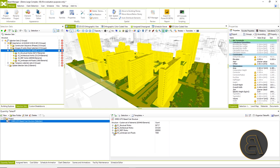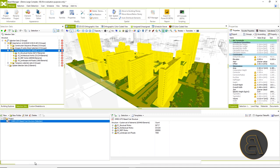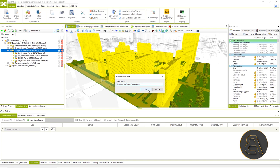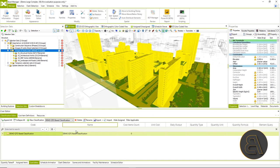Once we have generated the QTO, we can move on to creating a budget structure, a cost classification. And with the help of the creation wizard, we actually create a classification immediately.